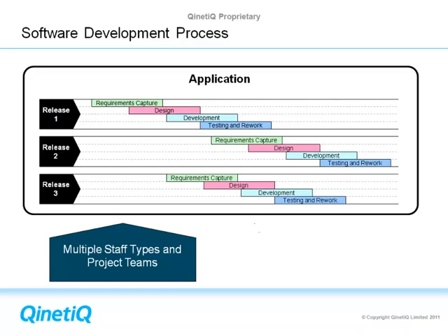And they have roles, tasks to do in each of the different phases. So for example, in the design phase, systems analysts will be responsible for one type of document, developers another type of document, and testers another type of document. And those types of resources are also in use in other phases of the project itself. So there's quite a complex allocation of resources to tasks as the projects go forward. And also those resources will be applied to different releases within that application, also multiple applications within the portfolio of applications.